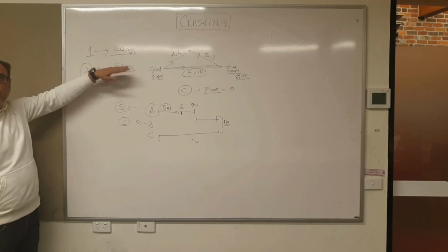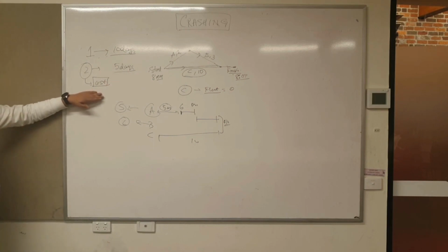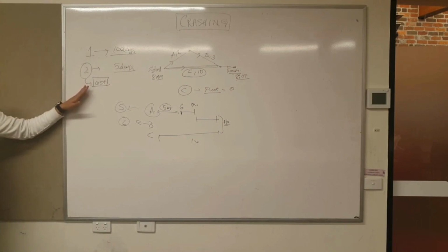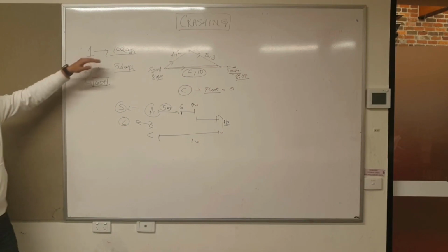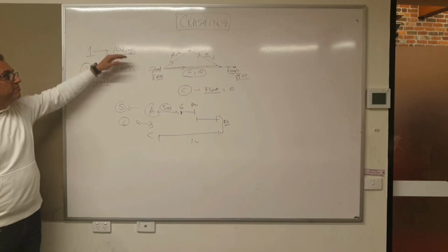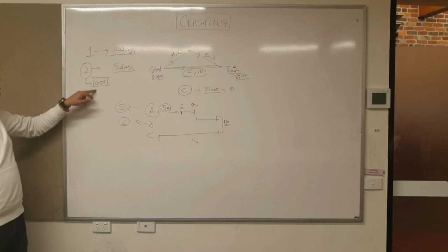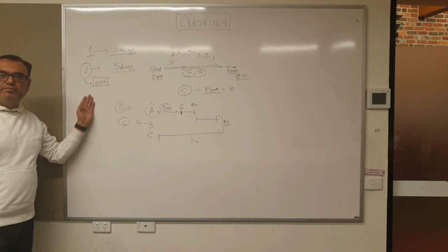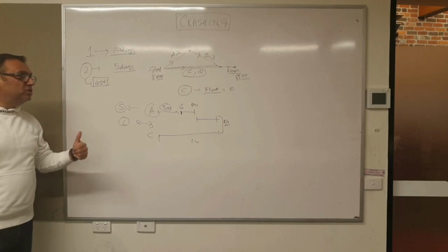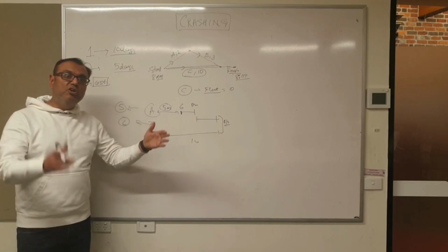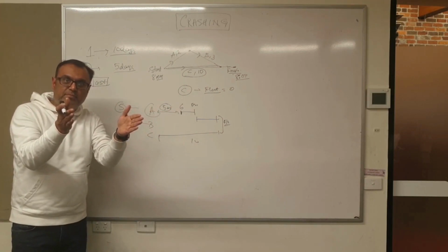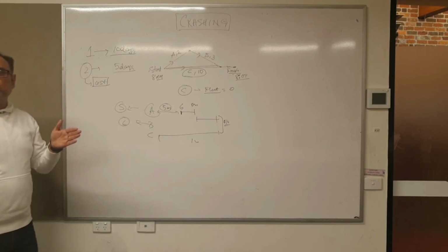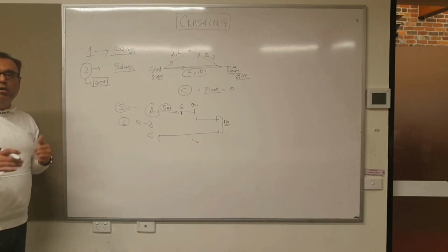So you reduced the critical path by spending some money, and that is what is called crashing. You crashed the schedule from 10 days to 5 days by spending some cost. Crashing is, by definition, reducing your critical time by spending cost. Let's see how.